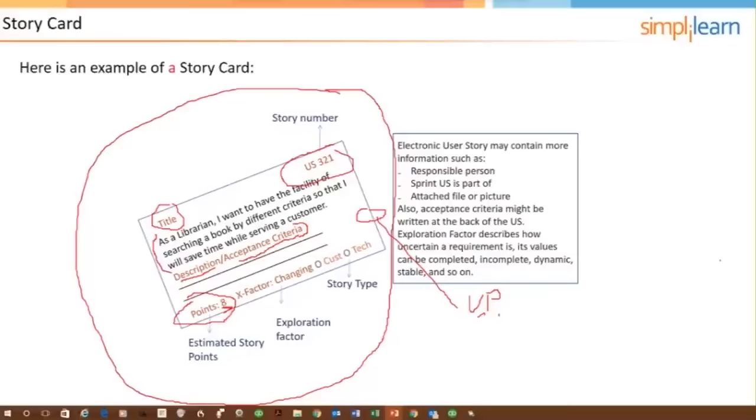And then typically there's also going to be an indication, sometimes it's just by colors, it could be words, that has to do with where the story came from. Did it come from the customer? That would be considered a functional requirement. If it came from the team, that would be from the technical domain. I'm trying to write where from. It's not me, it's the mouse. Clearly, it's hard to do that. That's from, where from. Here it's got customer, tech. You could also have defect. You could maybe have risk.